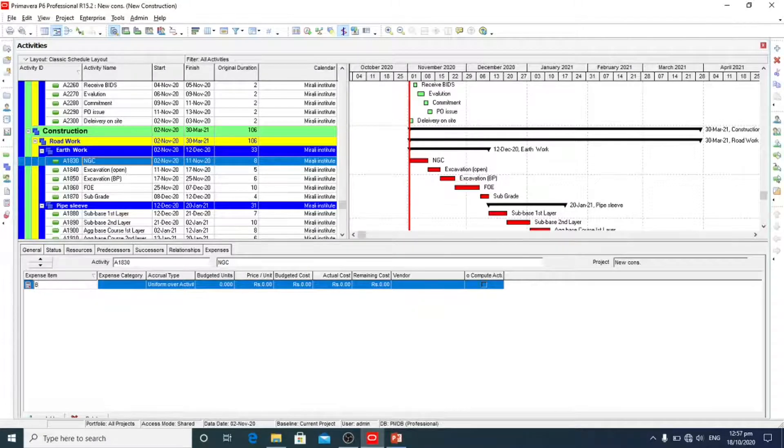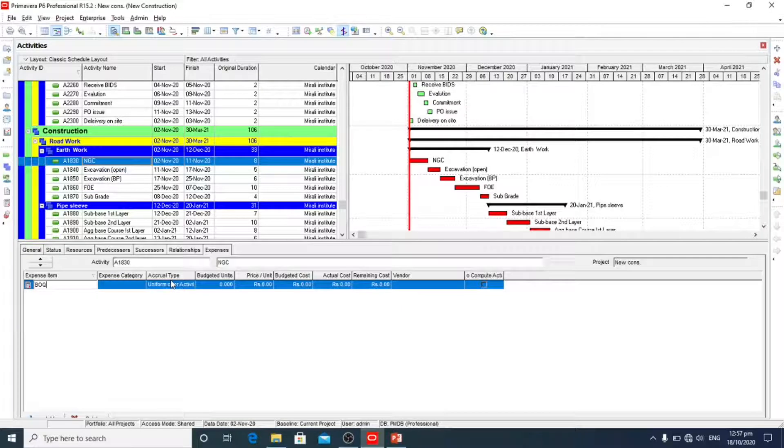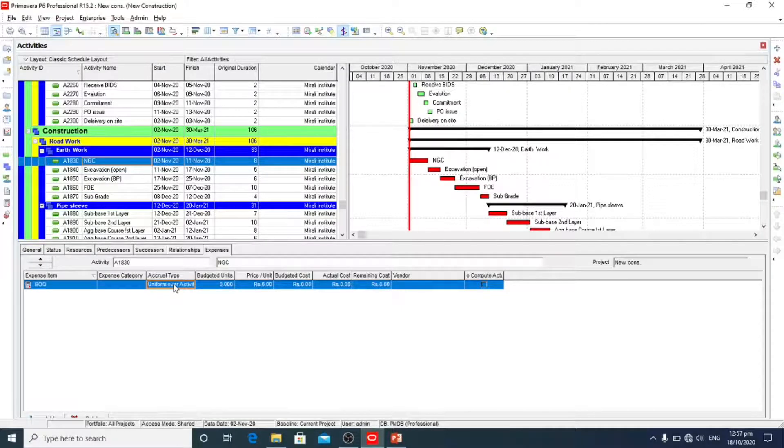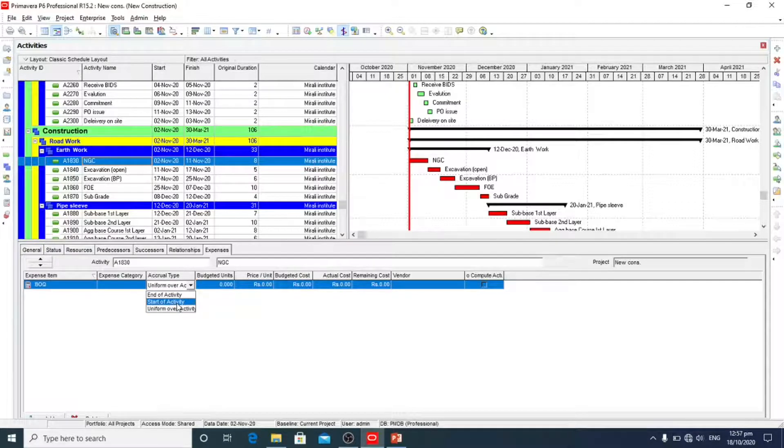We will write POQ. Accrual type, there are three accrual types: uniform over activity, start of activity, and end of activity.